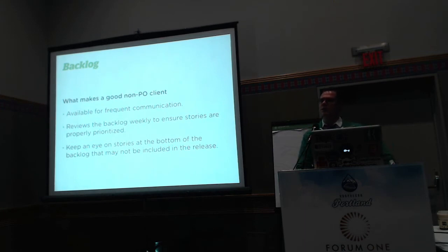This can be really difficult sometimes because it's a lot of overhead. It's a lot of work, right? Often being involved 15 minutes every day for daily Scrum, 2 to 3 to 4 hours sometimes doing sprint planning, sprint demos, retrospectives, all of the Scrum rituals. They have to be constantly reviewing the backlog. We recommend weekly, which is more frequently than per sprint, because things change in business.